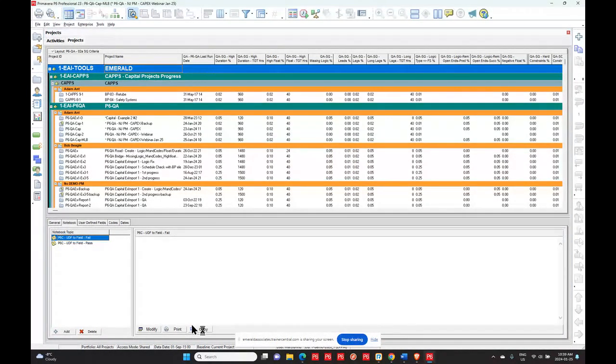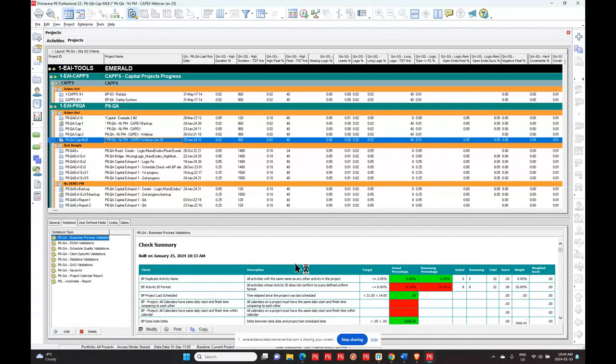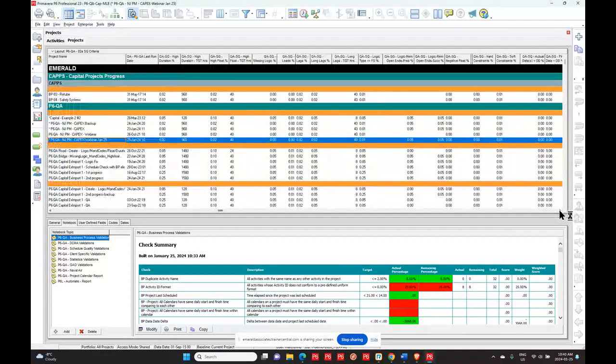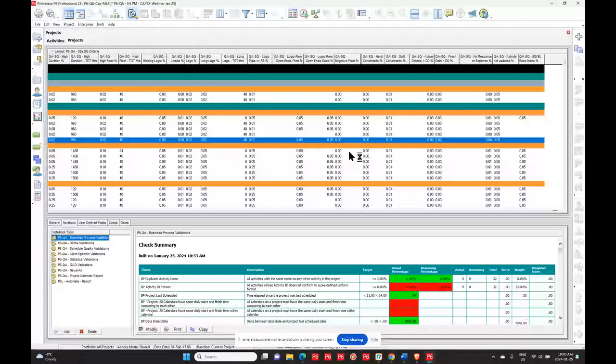So if I'm looking at setting criteria, this is my file right here, just to make it easier to see. High duration percent, 2%. High duration target hours, 960, and on down the line. I won't go through and read every one of them, but you basically just type these in to set the criteria. And if you need to change the criteria, you make the change and run the tool again, and it will give you the information against whatever your new criteria is.